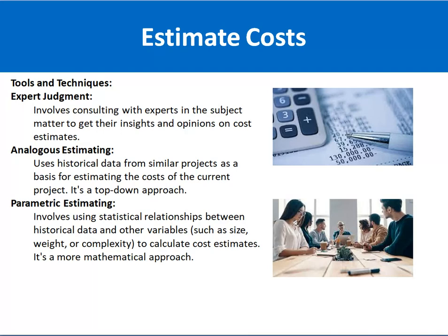Next is another approach or technique, the analogous estimation. Analogous estimation is a top down approach in which we use the historical data of a previous or similar project. For example, if you are implementing an e-commerce project and in the past the project was completed with a cost of $5,000, you can say the similar project of the e-commerce solution could be completed with the same or similar cost. So this is called the analogous estimation approach.